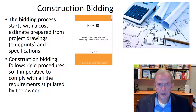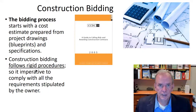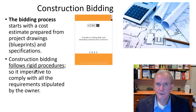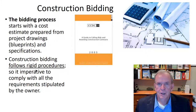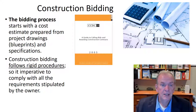On some private-public partnership hospitals, the amount you spend putting together a bid can be in the millions of dollars — you're responding to an RFP. You're not going to be happy if the project was awarded unfairly when you spent millions putting together a bid. You want to make sure you get your fair share because you'll go bankrupt if you keep spending millions on bids and never getting them. If you do get a 1.4 billion dollar project, that's a good one, so you can afford to lose a few as long as you're getting some.